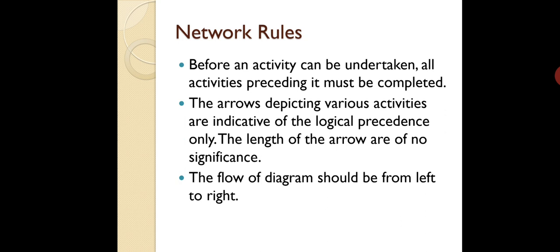Before an activity can be undertaken, all activities preceding it must be completed. Then only you can start that activity. So before you initiate any activity, the predecessor must be completed. The arrows depicting various activities are indicative of the logical precedence only, and the length of the arrow does not have any meaning. You can make it small, you can make it big, but it should not be curved or bent. So the length does not have any meaning.